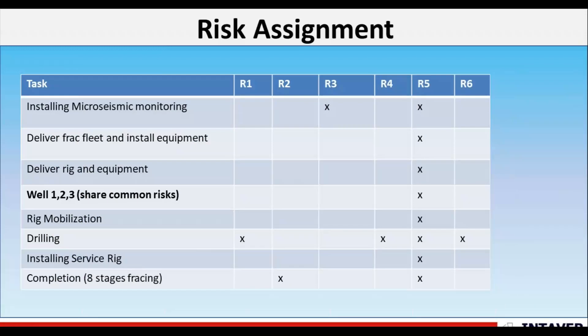A risk assignment could look something like this. We have several activities that we've identified as being affected by these risks, and we have risks numbered one to six. This gives a nice visualization about how we're going to assign these risks to the schedule and project plan. Some activities have multiple risks, and conversely a risk can be assigned to multiple activities. Risk number five is a weather risk and will be assigned as a global risk to all of the activities.